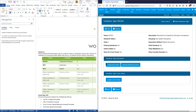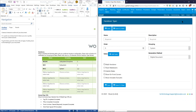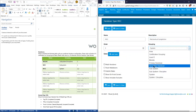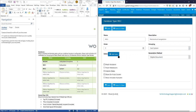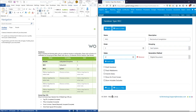We're now at the point where we can configure the handovers themselves — the cover sheet and the sign-off sheet — but I won't do that just now; we'll save that for another video. So let's go and do the other two handovers. Next we've got MCC — Mechanical Completion Certificate — that's number two, covering all the subsystems, and we'll go with just one gate for that one.